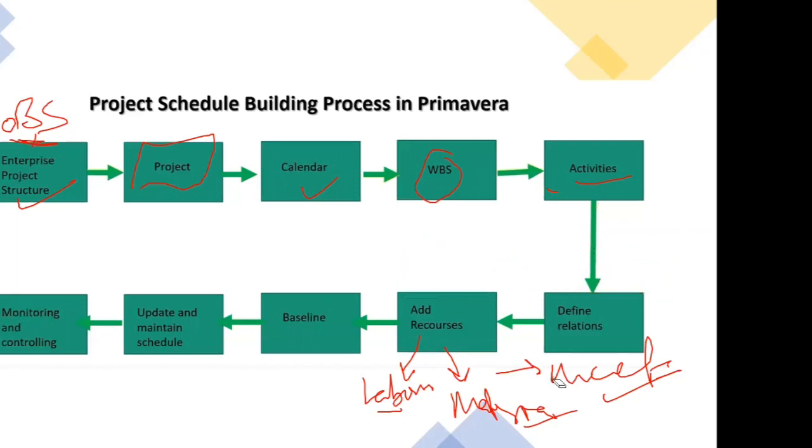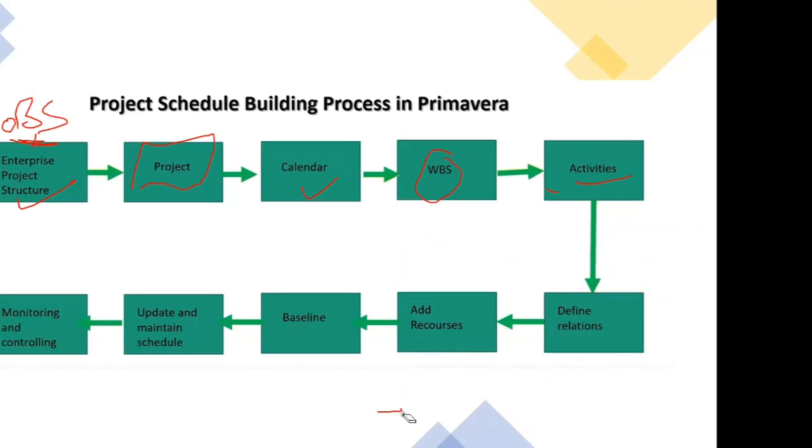And because of this delay in this particular activity, you have pushed all the other activities of your project also. So it may happen that if this activity was critical, and even if you have delayed this particular activity one single day, your entire project has got delayed. So that is why to track a project, to monitor your activities becomes important.